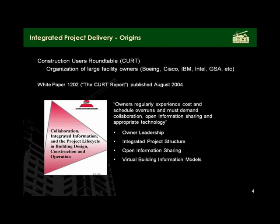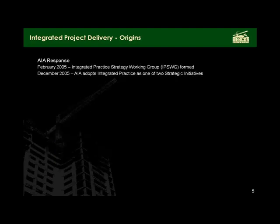The second point was an integrated project structure. Third, open information sharing. Projects done for decades, if not centuries, under the design-bid-build process tend to have silos of information where people protect the information they generate. The idea was that this information all needs to be shared for the good of the project. Specifically, CURT called for the use of virtual building information modeling. A number of industry groups responded immediately because this paper had some pretty far-reaching impact — it just rang true to a lot of us.